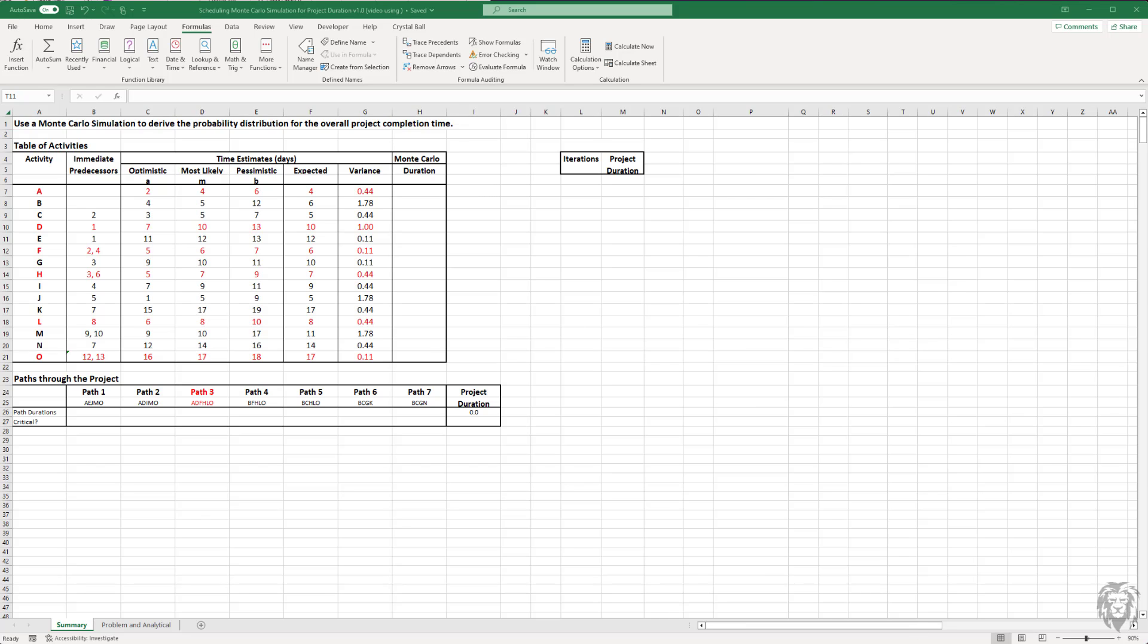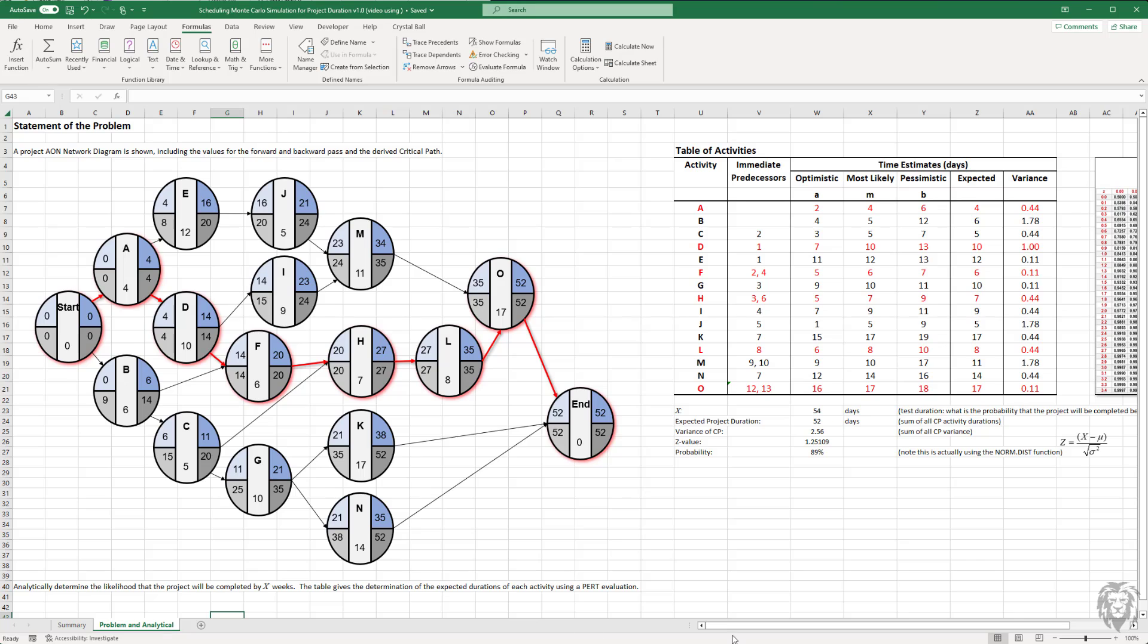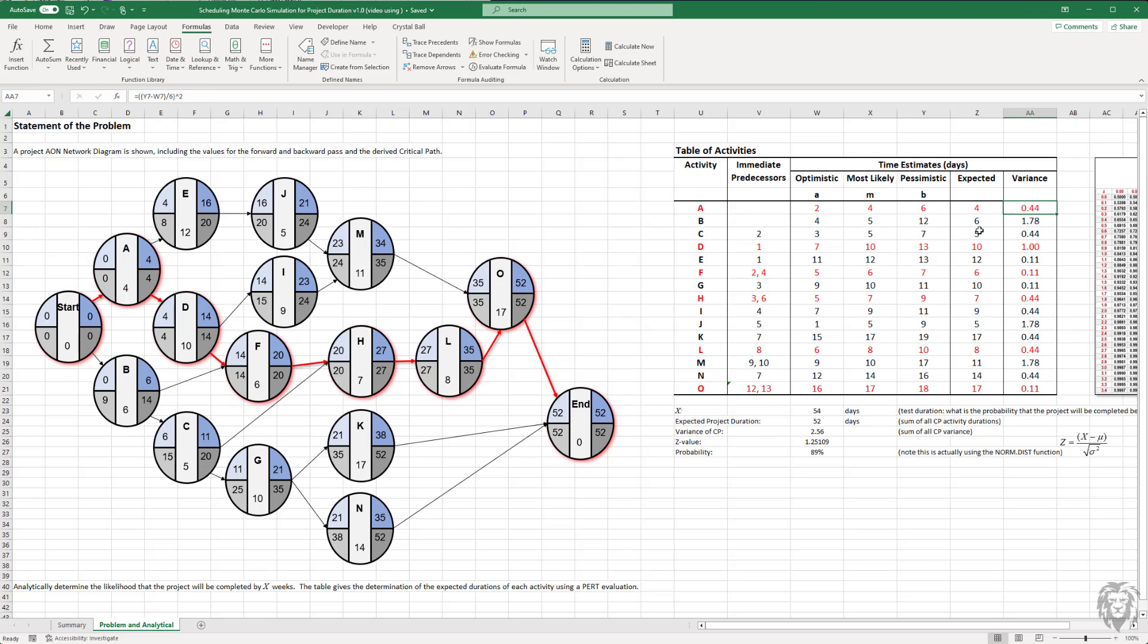I've set up the spreadsheet. Let's look at the problem itself. I've taken those various activities that we saw on the previous page using their expected durations. In the table, we have optimistic, most likely, and pessimistic. We're using a PERT evaluation to arrive at the expected task duration along with the variance of that task duration.